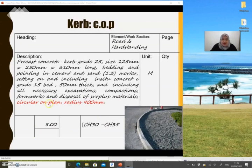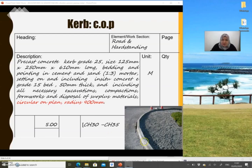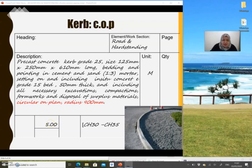If you have a circular on plan kerb, it must be measured separately, mentioning the radius of the curve. This is because the contractor needs to price it differently due to the nature of work involved in laying a circular kerb. The unit is in meters and dimensions must always be given to two decimal places. Painting to kerbs — the quantity is the same and you need to specify the type of paint being used.